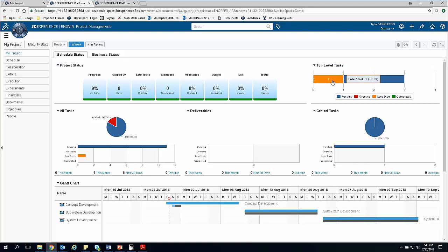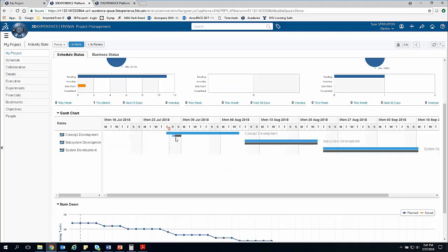So we should already be working on this phase, which we are now. So we're going to get that one done soon. We look down here, and now it's saying, okay, if you were able to accomplish that much, essentially 30% of that first phase in just this short amount of time, then I should be able to complete the rest in a similar amount of time, which is why this little actual estimated bar has now become so short.